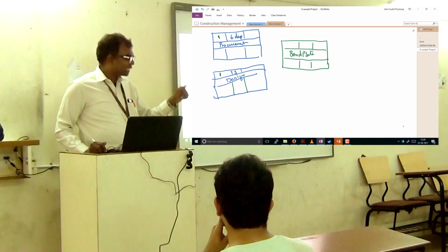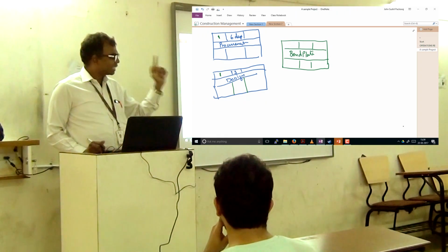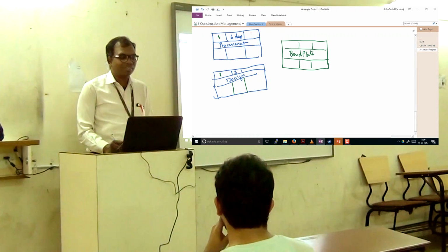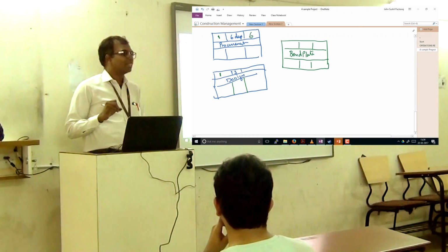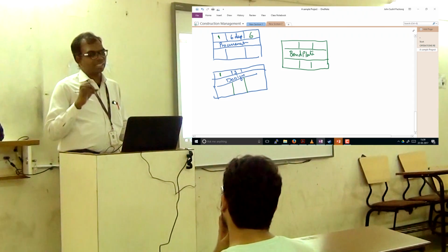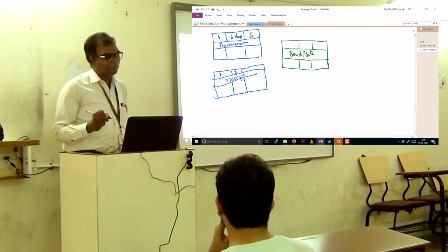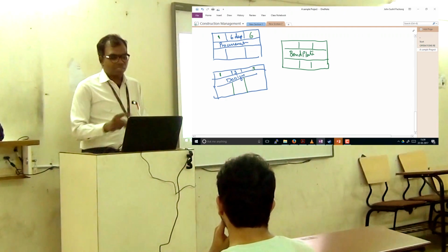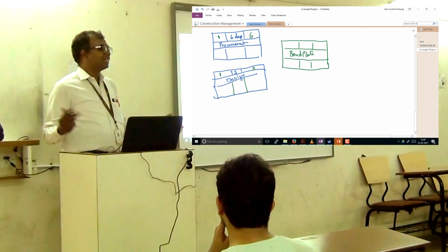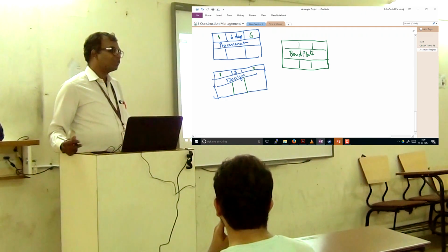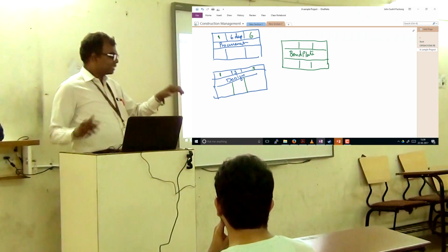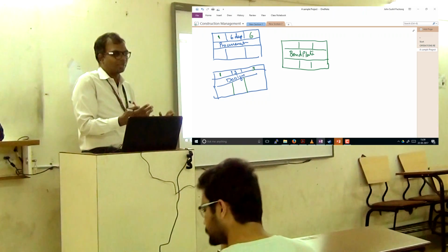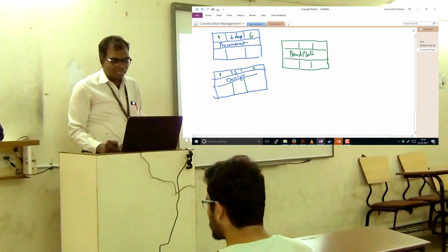It will finish on 6. That is first, second, third, fourth, fifth, sixth. So the earliest I can finish is on the 6th day. Now when will the design get over at the earliest? 3. Great. Now I come to this bending of plate. When can I start it? 7th day. 6 days are finished, so I go for the next available calendar day, which is 7.